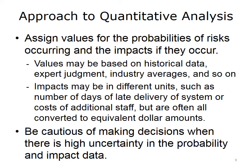Quantitative analysis of risks must be conducted carefully. Values for probability and impact of risks must be based on solid information. In some cases, you may have relevant historical data that can provide a good idea of the probability of occurrence — for example, if there is a history of power failures in your region and loss of power has been identified as a risk. In cases of integrating a new technology, your values may be based on the considered judgment of experts. Be cautious of making important decisions about risk priorities when you lack confidence in the supporting data.